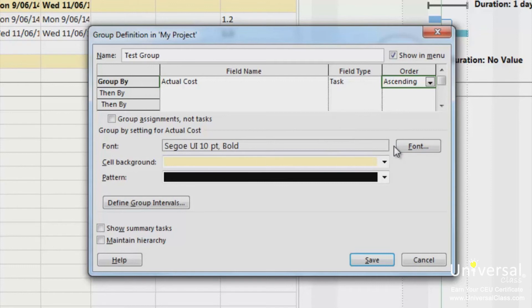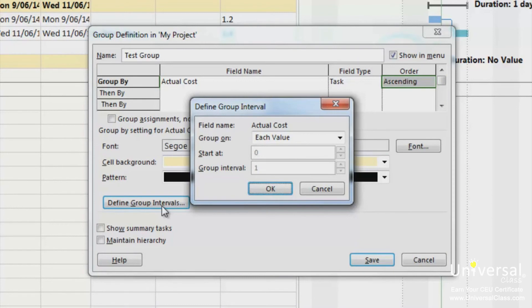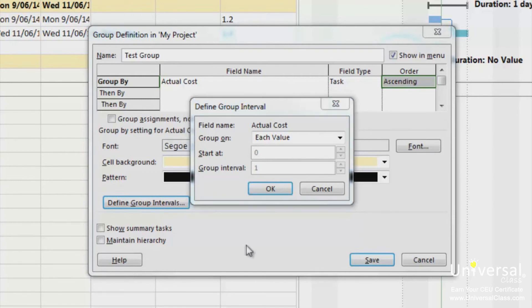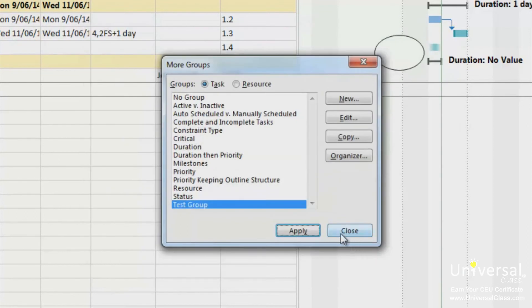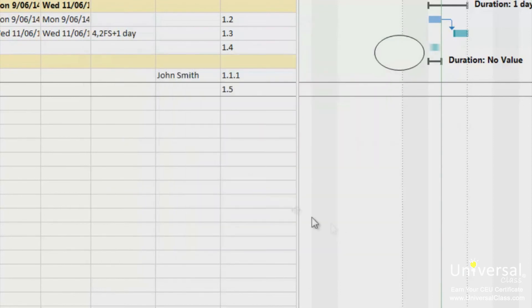If you click the define group intervals button, you can set a start time and an interval. For example, if the group by a criteria is standard rate and you select an interval of $10, your groupings will be in $10 intervals with $0 to $10 in one group and so on. Click save to save your group. And then click close.